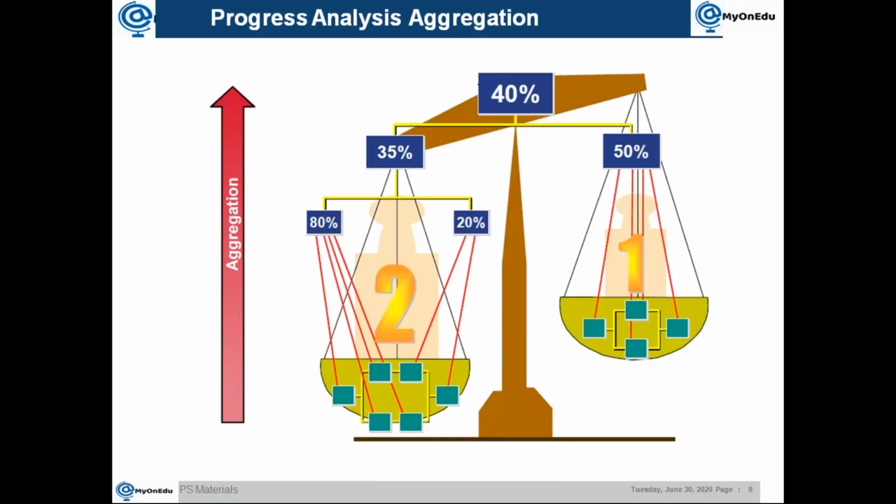If you take a project which is running, there are so many activities in parallel. Different activities may have different status, or different progress or confirmation done. So all that will be different values. Which value will you use for the project level? Because when you want to say what my project level progress is, there should be only one value. To reach that value, SAP has a function called the aggregated value.